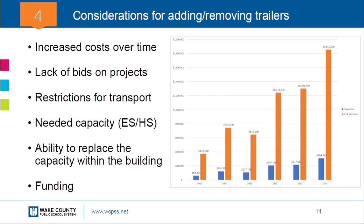So long as we keep the campus the way it is, everything, with the new code updates, is frozen. But if we make a major renovation, a partial renovation, all of a sudden we have to bring everything up to code. So you might lose all of this space you had on campus for the queuing or the stacking, because we have new requirements for stormwater and impervious surface. You've got to put these impoundment areas and stormwater mitigation things on the property. So you have less land on the site when you renovate it, because of all these add-ons you have to do to bring it up to code, if that makes sense.